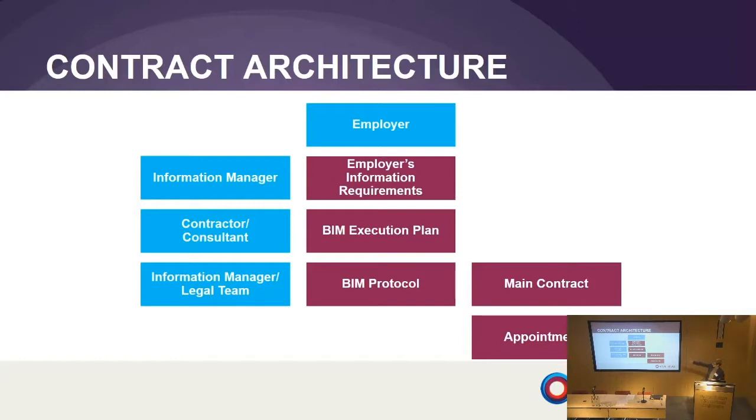So then the contracted consultants, in your case, reply to that document with the BIM execution plan. Kind of use the analogy of the design and build ERs and CPs. I think they're the ERs and CPs of the BIM world. So the employer's putting in there what they want. Contractor consultant team are putting in the BIM execution plan, how they'll deliver it back.